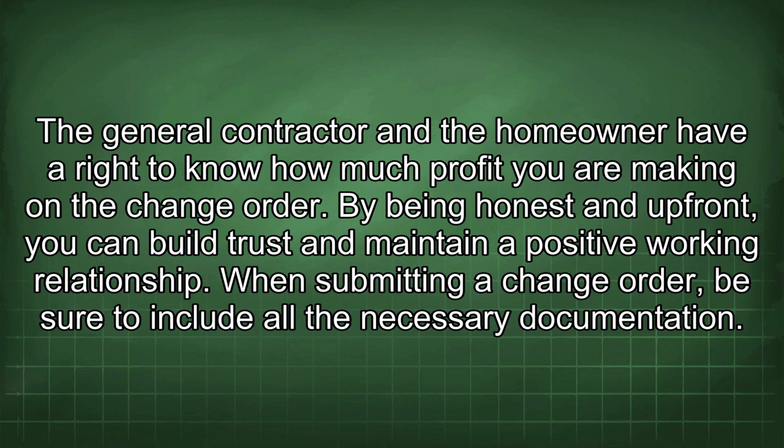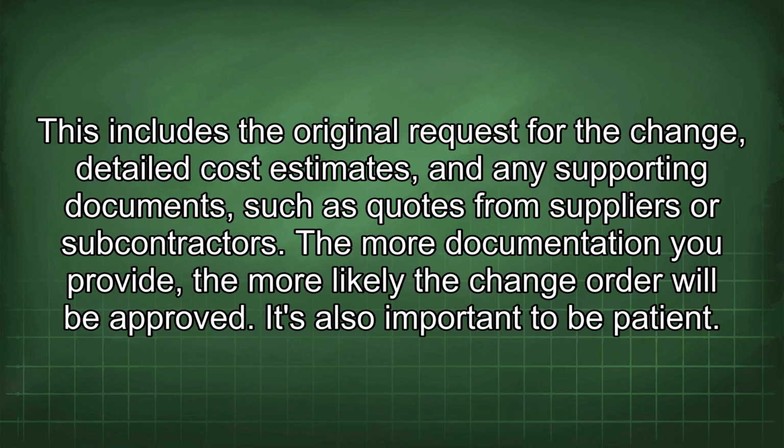When submitting a change order, be sure to include all the necessary documentation. This includes the original request for the change, detailed cost estimates, and any supporting documents, such as quotes from suppliers or subcontractors. The more documentation you provide, the more likely the change order will be approved.